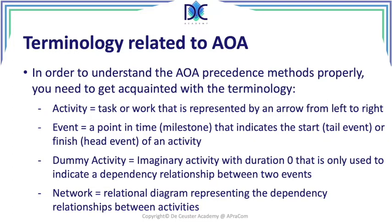An event is a point in time. We can also refer to it as a milestone, but here we have milestones related to activities. Typically we have milestones in a project which are more important events in the lifespan of the project. The event can indicate the start — then we call it a tail event — or the finish — then we call it a head event — of an activity. So we have an activity going from a tail event to a head event; it starts at the tail and finishes at the head.